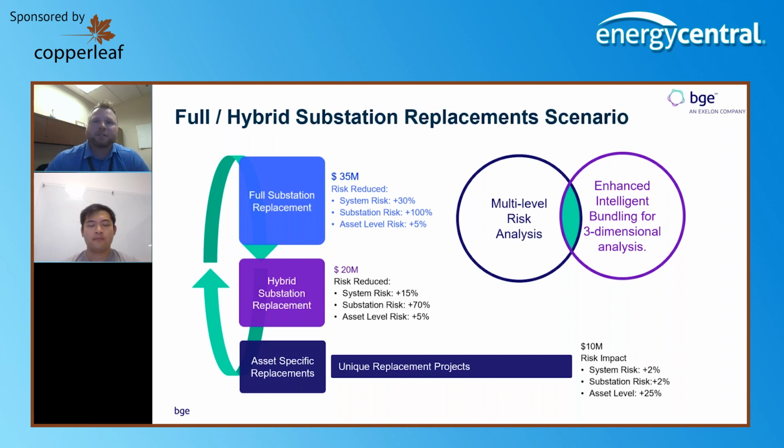And one of the nice things from this is, as we go through our project approval process, we're always looking for alternatives to whatever it was that we proposed. Sometimes that can be relatively difficult for folks to come up with because it requires an analysis, and then you have to get budget dollars for what that alternative is, even if you're pretty confident you're not going to go forward with it, right? It starts to be a productivity impact. This tool allows us, through custom reporting, to pull out those three options and show them. Regardless of what scenario we're recommending, we can have that information at our fingertips and include that in our processes.